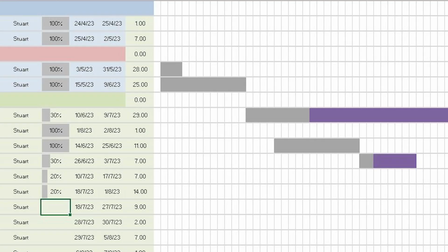Some Gantt charts show progress indicators. This is usually represented by having shaded sections of the horizontal bar. It allows you to see how much of the task is done versus how much is left and provides a quick visual cue on how well you're tracking against the plan.